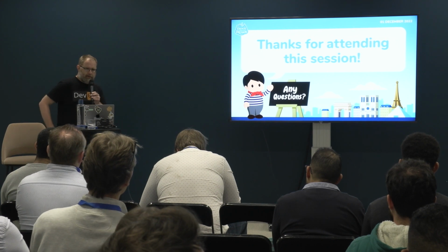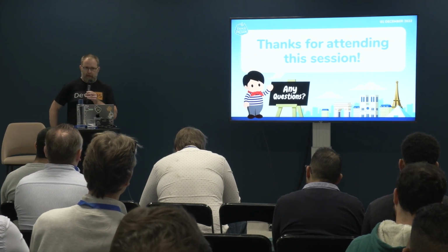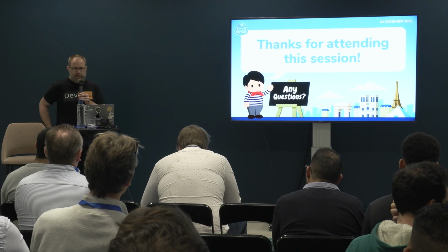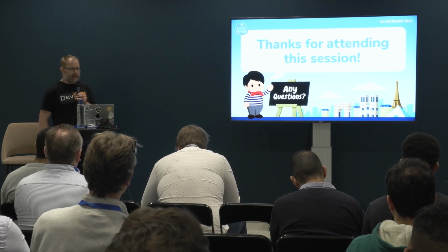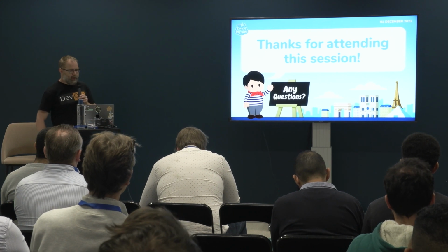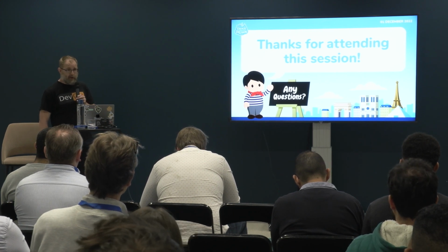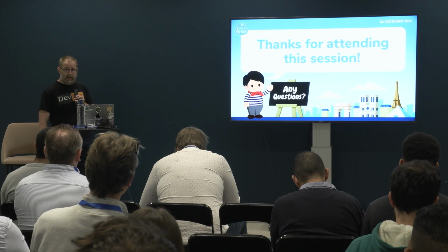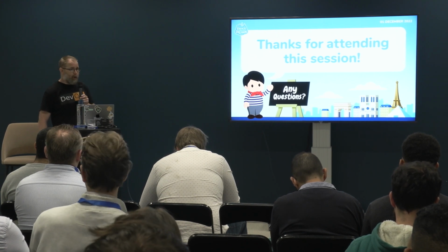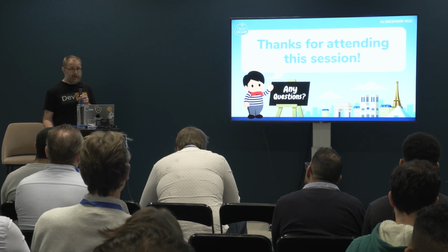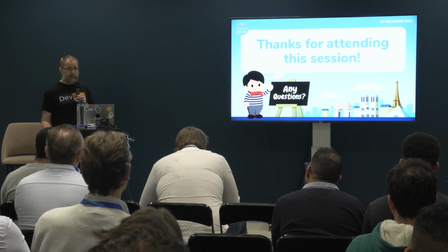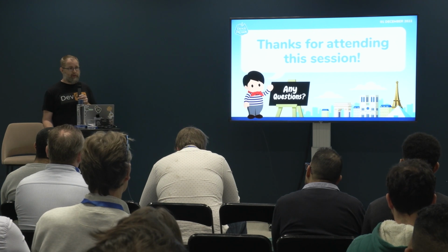Okay, so for the benefit of the recording, I'll quickly restate the question. Hotfix changes made into production, how do we propagate those backwards so that everybody gets them in their development environment? So absolutely, there is a branching strategy that will accommodate that. We haven't covered it today. However, what we would do is exactly that. We would have a hotfix branch that is used for that and is tied to the production environment. And then we would do one of two things.